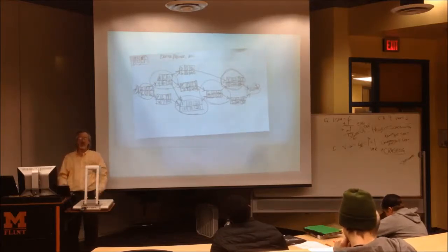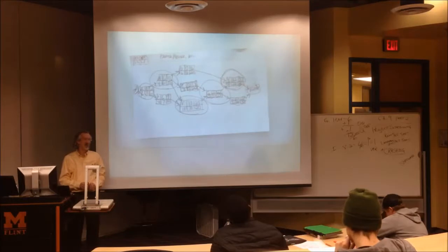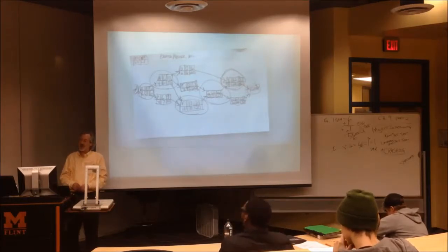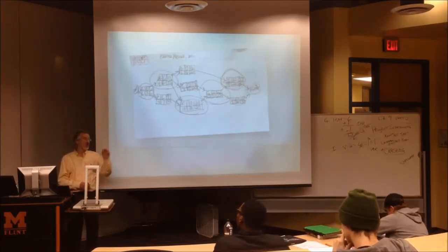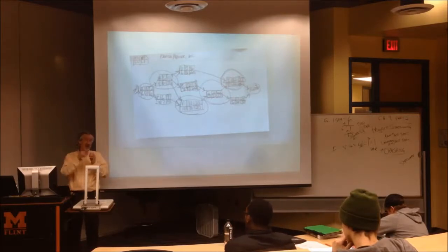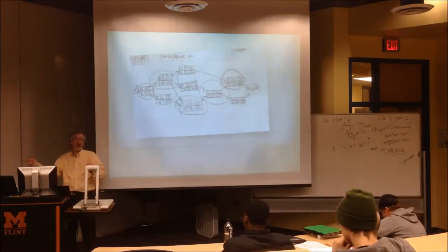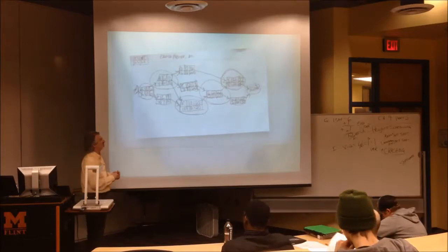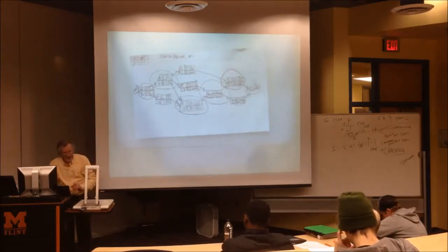You'll never get the right standard deviation. Almost never will it come out correctly. 99.9% of the time it will not be correct. You have to take all the variances and add them first, then square root, or you will not have the right standard deviation for the project. So be aware. All right, that's our review at that point.